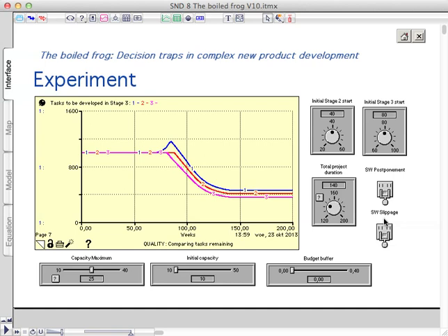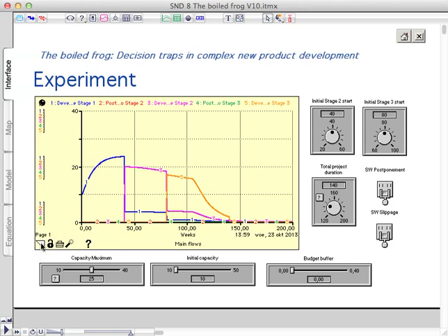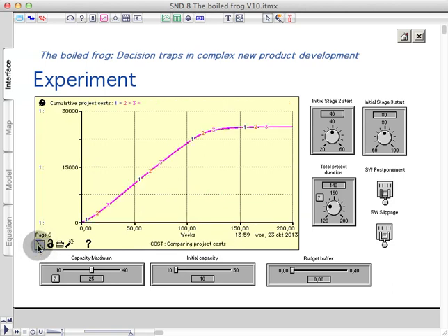And you see that from an overall project perspective, it's in this model at least sensible not to do so. Keep the dates fixed for the next start and start then with the first phase not completely done, and also don't postpone things to tomorrow that you could do today. Still, the project is not completed on time, that's true. If you look at costs, then the costs don't make any difference. For that we'll have to be doing other things.